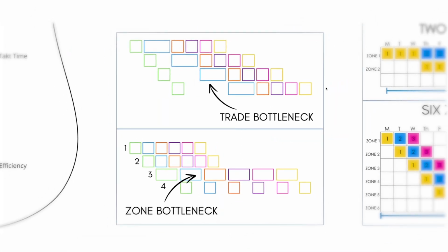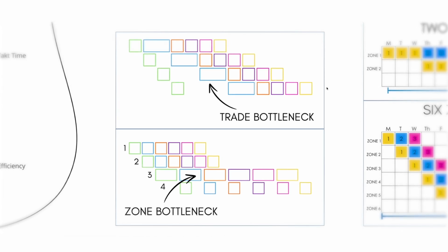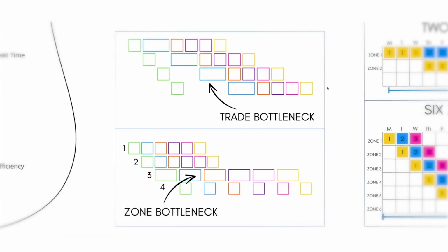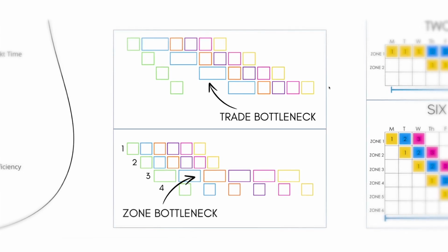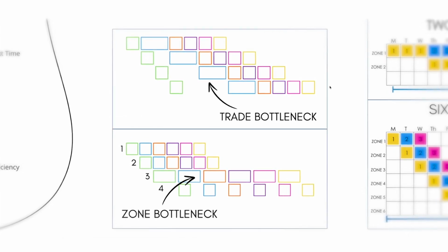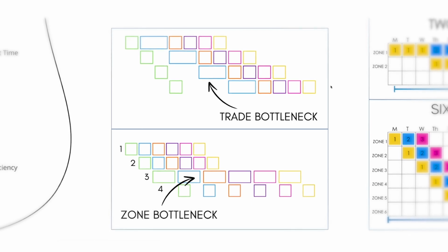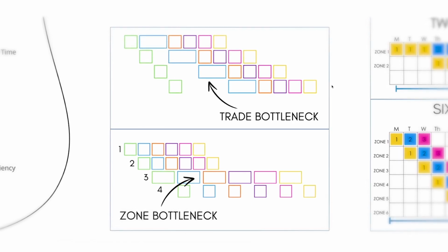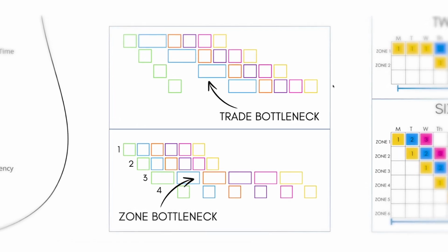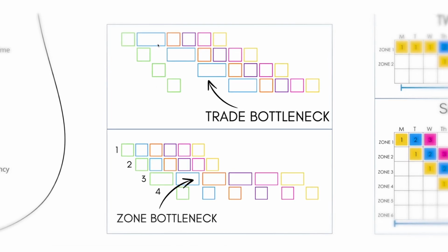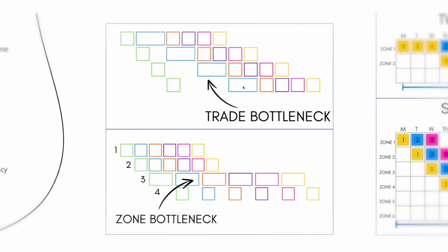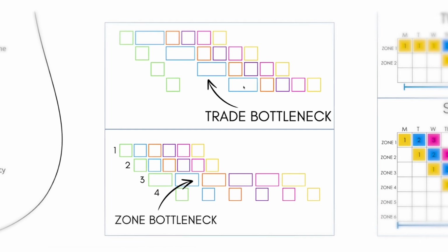When you have the time by location format, you can see your bottlenecks. So this really aligns with the theory of constraints, the book The Goal, the book Critical Chain, the books that the entire Goldratt family has written, including Rules of Flow, right? It's Not Luck. So Eliyahu Goldratt talks about always knowing where your bottlenecks are. So when you have it in a time by location format, you can see trade bottlenecks where you see that is the pace setter on your project, and that's how fast your project's going to go.